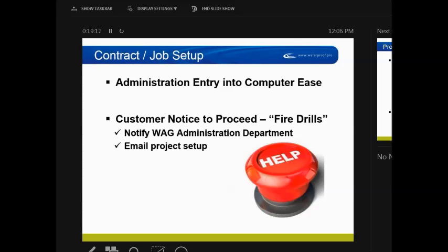Because when we do these pre-construction meetings and we start that job the next day, if we don't have that in the system, that Mandy fills out a work report, and he turns in that footage in the next week, and if that job's not set up or properly set up, then we run into issues with payroll and reporting in the backlog report. There's a lot of things that tie into that, so I think we all understand that.